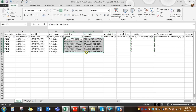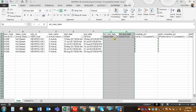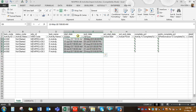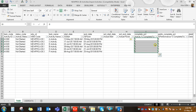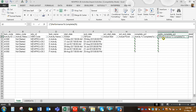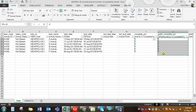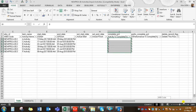Those Start and Finish fields with the asterisk in brackets are useless for importing — that is why I included them only to demonstrate this point. Then we have Actual Start and Actual Finish, which we do need to update. We also have Activity Percent Complete — but as I noted, the asterisk-in-bracket symbol means these fields also do not work when imported back. The activity percent complete is the most important field we are going to update for each activity.